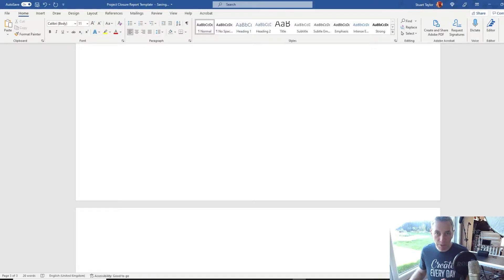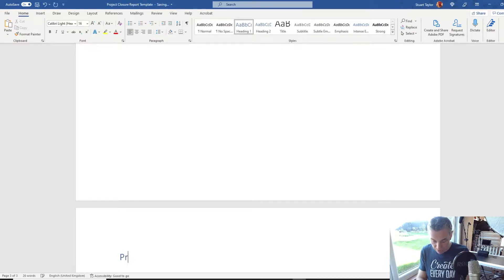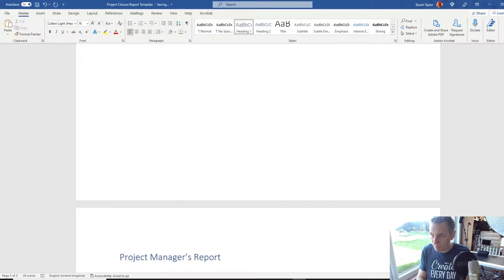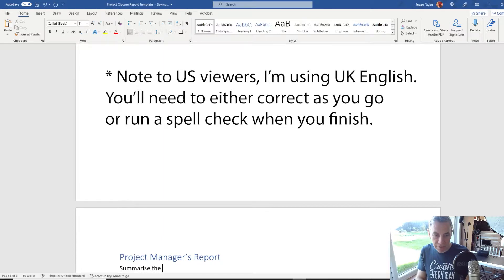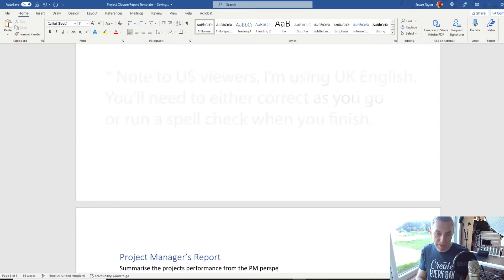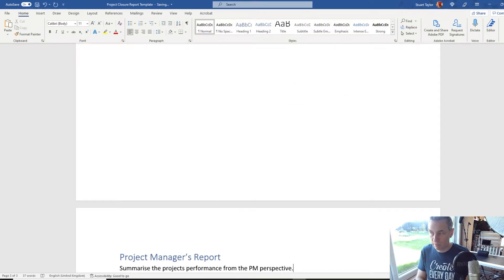The first item is the Project Manager's Report. Go to Heading 1 and put the title 'Project Manager's Report'. Put a note here to summarise the project's performance from the PM perspective. When you actually start filling out this report, you might want to come back to the project manager's report last. If you complete the other sections first, you'll have those ideas at the front of your mind and be able to write this section a lot more easily.